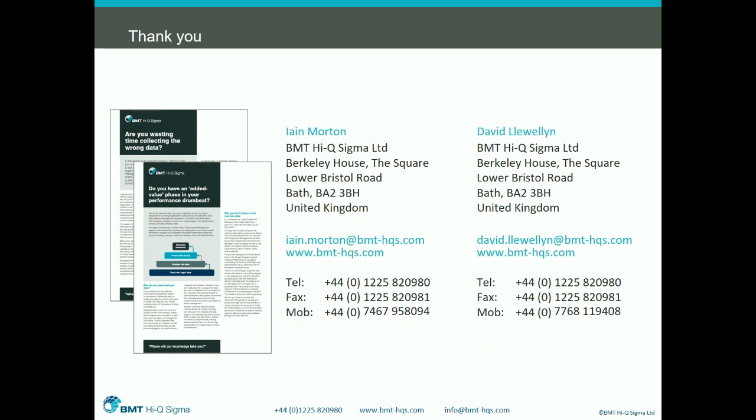To be honest, Michael, it's not the answer you're going to be looking for, but I think it's entirely dependent on the size and the complexity of the project. How we tackled it in DNS was we developed a project controller's drumbeat. So in the first half of the month is about obtaining the information and statusing your project to make sure that your artifacts are correct. And in the second half of the month, it's about the analysis piece, the reporting piece, and supporting that.